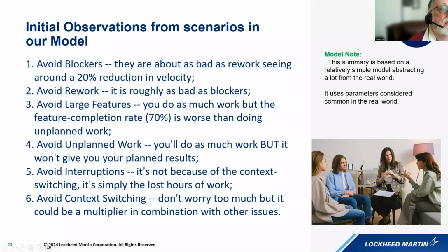Large features, they don't impact how much work you do, but you end up not finishing the features you planned because the ones you have are much bigger, and then the chances of the right stories finishing to complete your feature is much less. Again, with unplanned work, you'll do as much work, but it won't give you the planned features because a lot of the work, by definition, was unplanned.